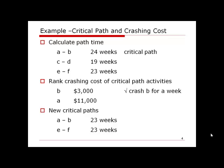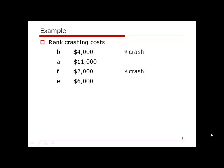We must reduce path AB and path EF at the same time. For path AB, crashing A costs $11,000 and crashing B now costs $4,000 (since the first crash was already used), so we crash B again. For path EF, crashing F costs $2,000 and E costs $6,000, so we crash F. Total cost for this round is $4,000 + $2,000 = $6,000, and we still save $12,000.